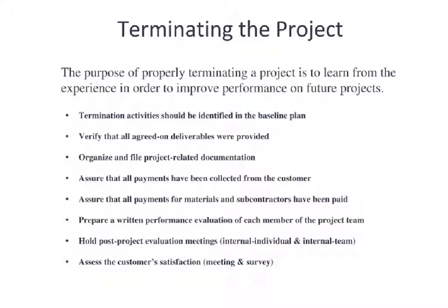If you're doing a smaller project, shorter duration, smaller budget, I think the book's technique is still sufficient. It has all the components necessary. It has assessment of the risk, identification of the risk, trigger event listed, and action plan listed. Those are the big ticket items. So it's sufficient for a smaller project.